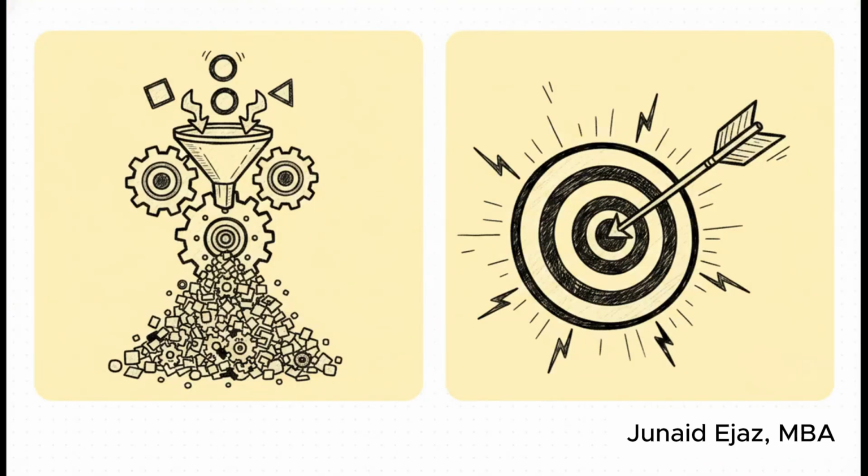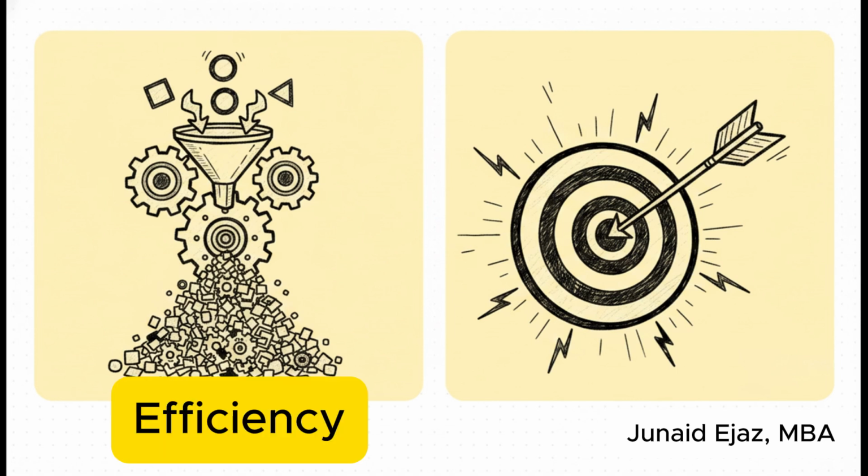Okay, so the absolutely crucial point here is that benefits generally fall into 2 distinct categories. Picture them as 2 separate funnels. First up, we have efficiency benefits. Think of this as doing more for the same, or doing the same for less. We're talking cost reduction, cost avoidance, or maybe processing way more queries without adding any new staff.